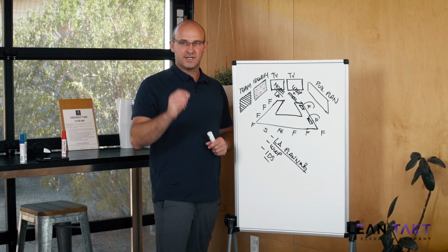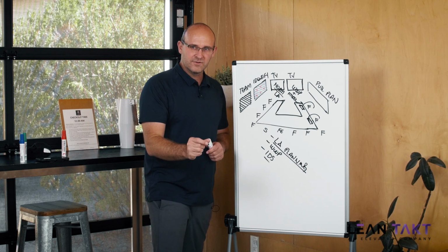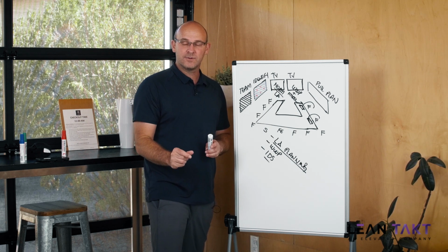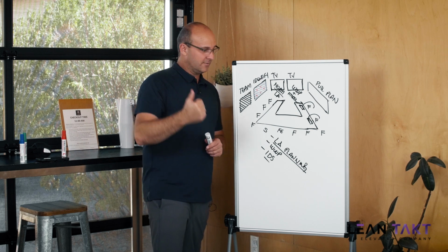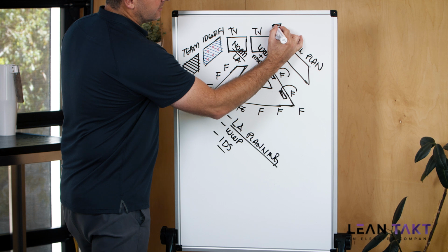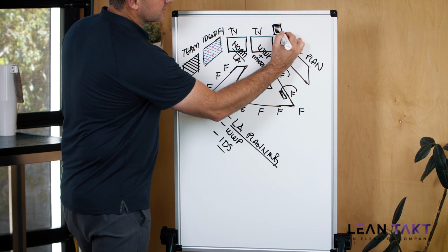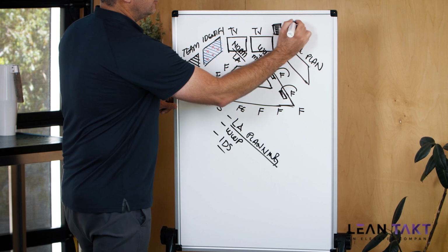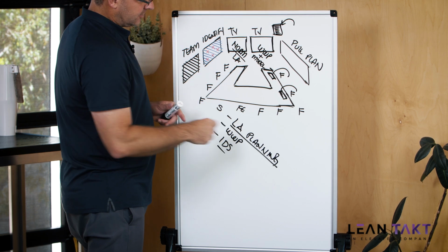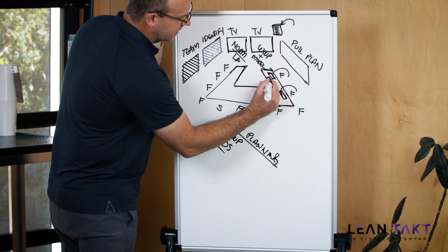Please, please, please look at every single one of your work packages, every single one of your activities, every single takt wagon that you're a part of, and ask yourself, and sometimes I like to have the list up here: do you have the labor, the tools, the materials, the equipment, the permissions, the layout, the information, right? You can just trigger them. Or you can have it printed out on the conference room table.